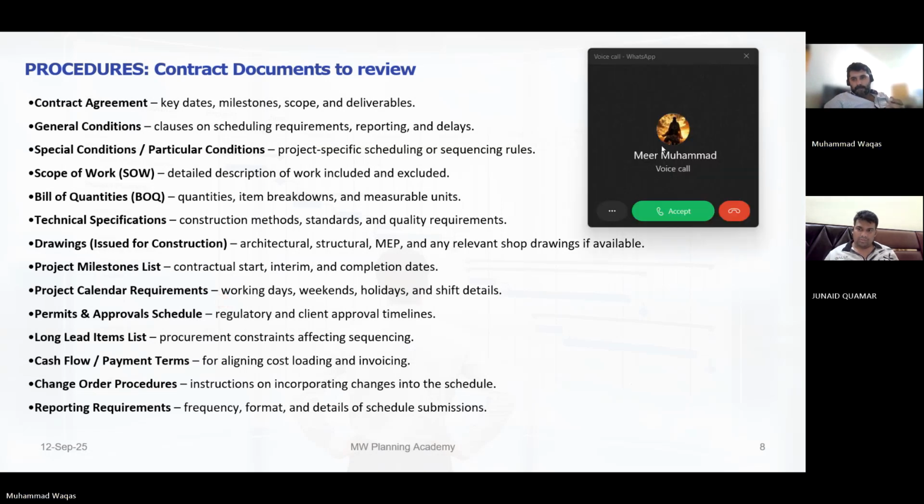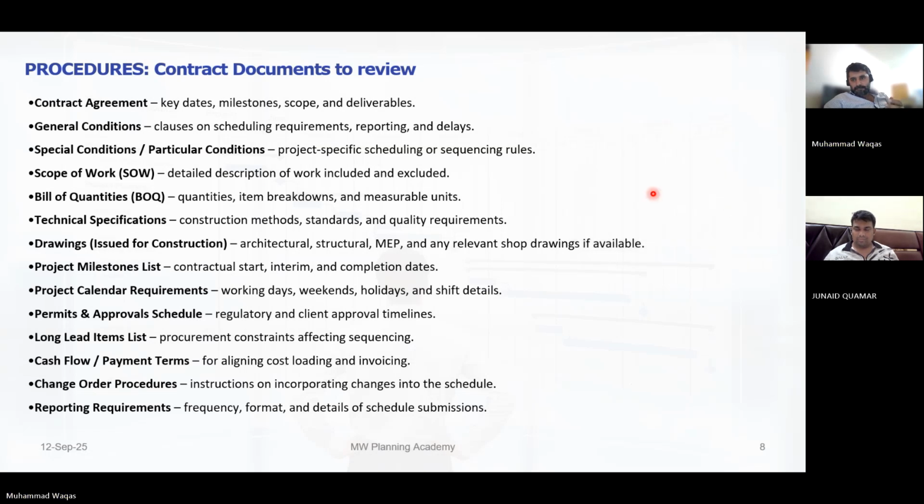If the material is coming from, let's say, Europe, and it is in the sea, it will be in the sea for a full 7 days. It will not obey the conventional 5-day calendar, and it will hold within the sea for 1 day.